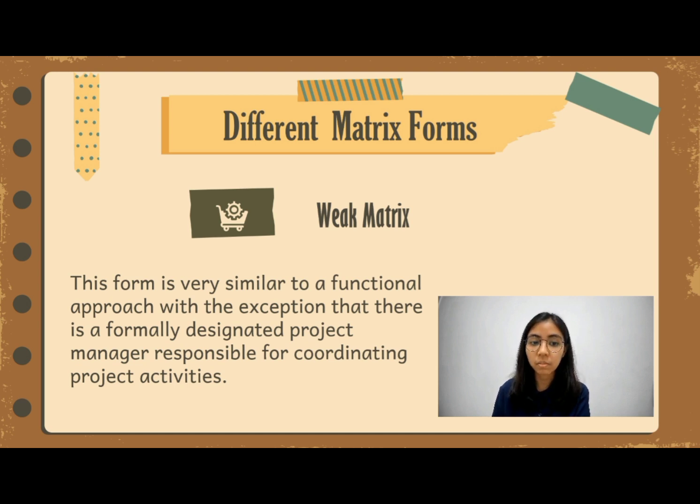The project manager basically acts as a staff assistant who draws the schedules and checklists, collects information on status of work, and facilitates project completion. The project manager has indirect authority to expedite and monitor the project. Functional managers call most of the shots and decide who does what and when the work is completed.